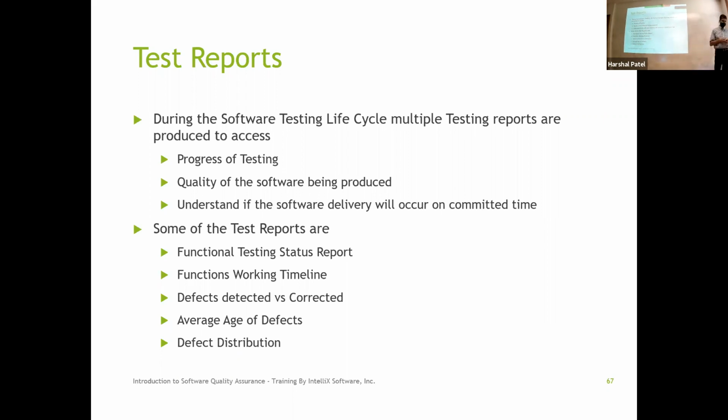For example, let's say I have to run 500 tests to test a system and I have 10 test days. If I'm running at a test velocity of only 10 tests a day, do you think I can meet that timeline? Probably not. That means as a project manager I need to either give you more time or give you more people so that I increase 10 tests a day to a higher number, which is 50 tests a day, because that's where it's going to meet the timeline.